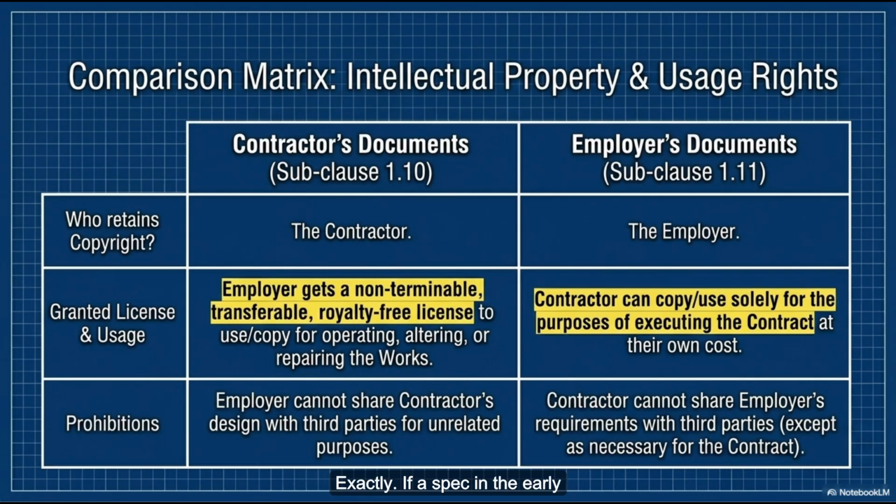If a spec in the early contractor's proposal says they'll use standard steel, but the final contract agreement specifies reinforced steel, the agreement at the top of the pyramid absolutely crushes the proposal at the bottom.